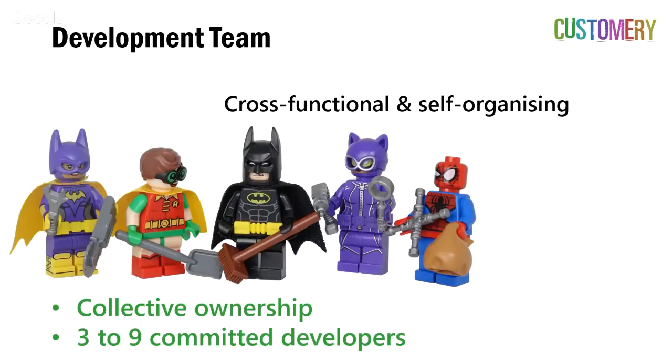When I say committed developers, what I mean there is that they're solely committed to your Dynamics 365 project. Scrum doesn't really work so well when some of the developers who are on your project are also doing business as usual kind of support work for a previous system that they were working with. So I don't mind working with part-time people who I know their hours are 30 hours a week or 20 hours a week. That's awesome. But when I have developers who are assigned to the project, but who keep getting distracted by other projects or other work, then that really doesn't work so well. So make sure that you've got the commitment of those people's time to your Dynamics 365 project.